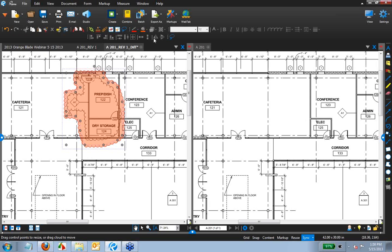So we put together a plan to spend a couple weeks, borrow a few employees from another office, and do a page turn. And the client wanted it done faster and no additional cost involved. So we were scrambling, and thankfully a consultant had found Bluebeam software before and told us, hey, you should try this compare documents feature, and it worked great. We had been disciplined in creating all our pages out of Revit using the exact same PDF creation tools over and over. So this was an awesome way for us to then compare those files we had published directly from Revit.